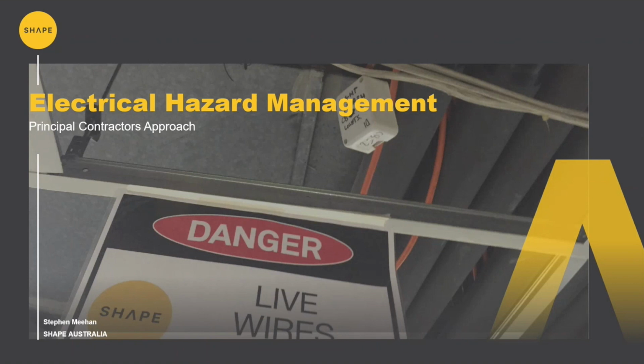We've had many examples of cables dropping out of ceiling spaces that are not terminated, sometimes live, obviously presenting significant hazards, as well as unsafe electrical conditions around electrical switchboards and a myriad of other conditions within those buildings. So until you start peeling away the layers, you just don't know what you're going to get. Our procedure really does focus on not allowing any work to take place on any of our sites prior to our electricians actually coming and doing an electrical survey, and that is to identify electrical hazards and then manage and control those hazards. So it's quite a significant sort of process.